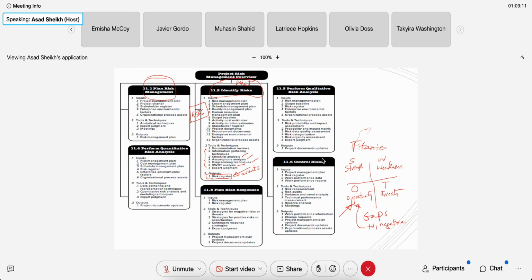And then once you get down to the WBS, then you say, okay, I can see everything, because the WBS is going to show you everything, right? So let's draw a WBS. And why do I say that? If this is the house, then you got these deliverables: plumbing, electrical, and then you got the foundation, you got the framework, and you got other things, right? Miscellaneous stuff.